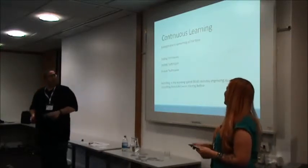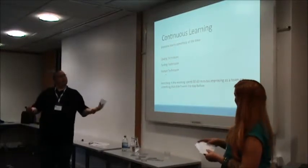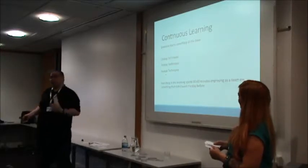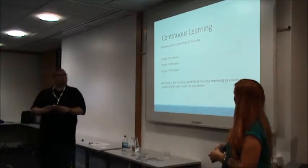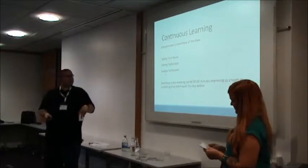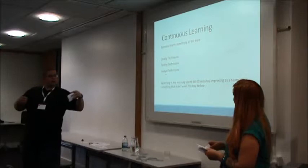The other thing that's interesting about the way he talks about it is that every morning they'll sit there for half an hour to an hour and go, what didn't we do so well yesterday and what can we learn? So maybe we didn't do TDD so well, or maybe we didn't do BDD so well, or something didn't go so well that we wanted to do. So some coding techniques, testing, analysis techniques. So 30 minutes in the morning, that's the first thing you do.